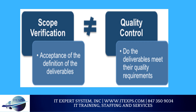One of the key jobs of the project manager is to ensure that the team and everybody involved with the project is ensuring that the scope is verified. Any changes to the deliverables — meaning any changes to the scope — should not deviate from what the original overall definition of the project was. So scope verification needs to be maintained throughout. It's good to note that scope verification activities are not the same as quality control activities. Although throughout the course of the project you are making sure that quality control is well established and maintained, it is not the same as scope verification, although the two activities may seem extremely similar.